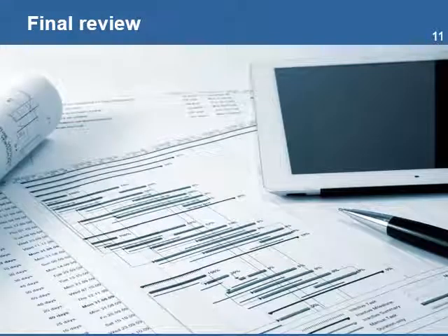Once all changes and modifications have been made, it's important to make a final review to ensure nothing is missing or there are no serious conflicts with the project schedule and the expectations from key stakeholders. Once the schedule is ready, it will be approved and distributed to all the people involved with completing the work in the project. They will use it to plan their work and monitor the progress they make.